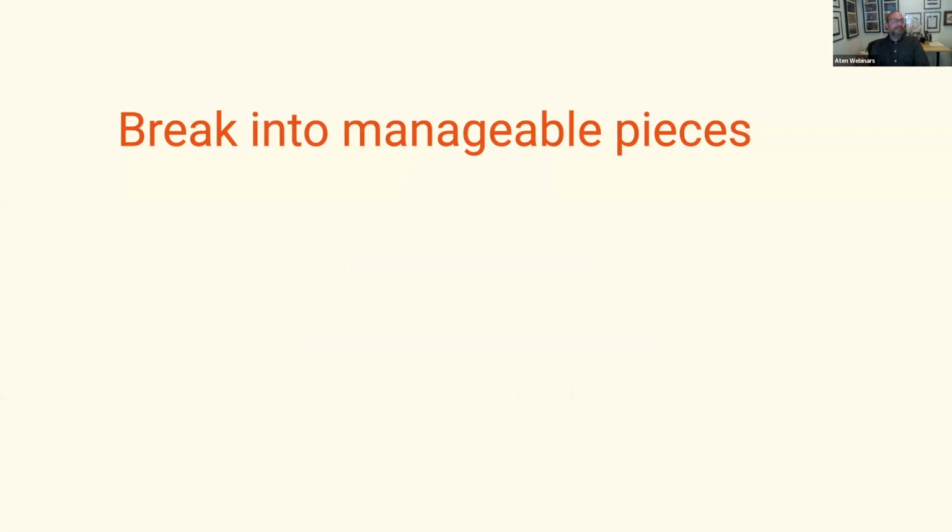Now, sometimes you have a large digital project and you can't break it down, right? A lot of times when we're taking on website development projects, the first 2 or 3, maybe even 5 months of the project are discovery, architecture, and design. We're trying to figure out what needs to be built. And if you're in that place, sometimes it's impossible to define at a granular level all the tasks that need to be done on the project.